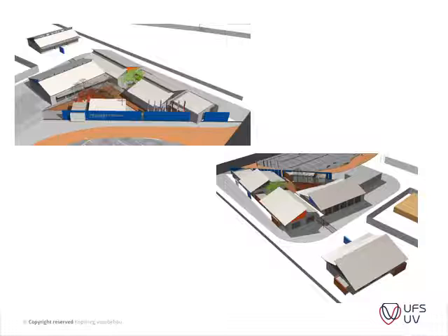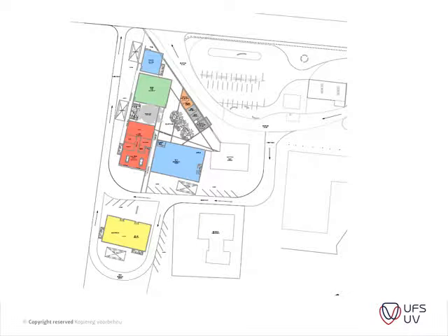This was a small service center of office spaces that was provided. There was a space for a tire dealer, a little radio station, health and safety, clothing store, etc. So this was just a small concept that was done, and then the architect provided us with the following details. You can see it's just a footprint of the drawings or the layout of the site, and on the site we could establish what the square meter areas were for everything, and from this we could develop a basic estimate.